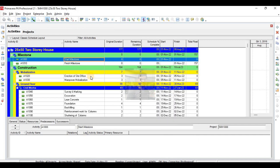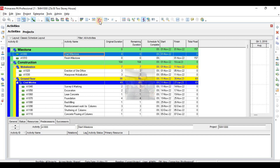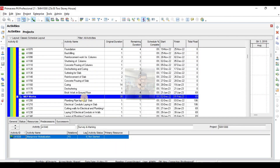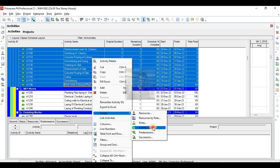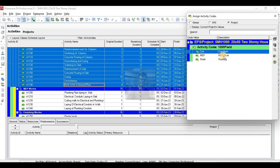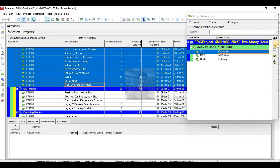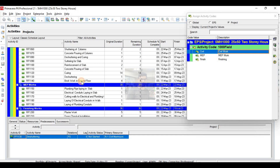Now I want to filter my project. My client has asked me to send him only civil activities, so I want to filter my project for civil activities only. For that, first I have to assign activity codes to my project. I'll highlight the civil activities and assign activity codes. I want to see only civil work assigned to these civil activities. This one is also civil work — assign civil activities to this. And this one is civil work.